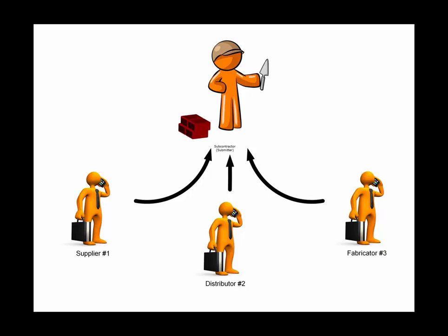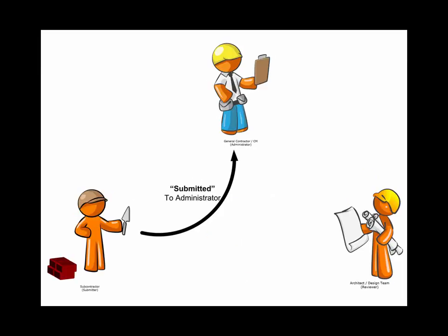This process can be fairly time-consuming for a subcontractor, as each project may have a different way to manage the submission process. However, all of the processes require that the contractor submit the correct product data from the manufacturer or supplier. Once the contractor has located the documents required, they can simply select the file and upload it directly to the system. The uploaded information is automatically routed to the construction manager or general contractor for review.